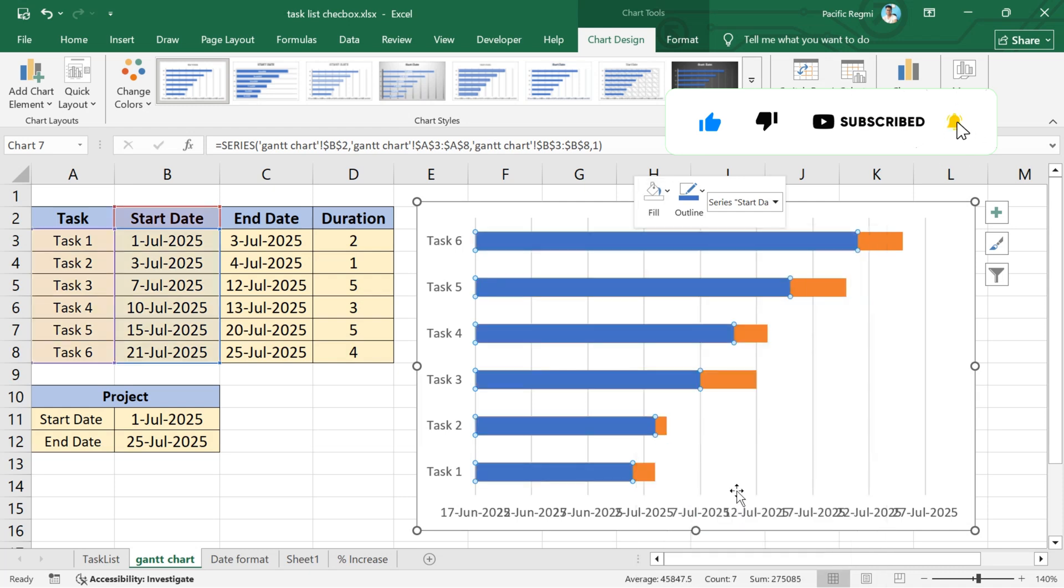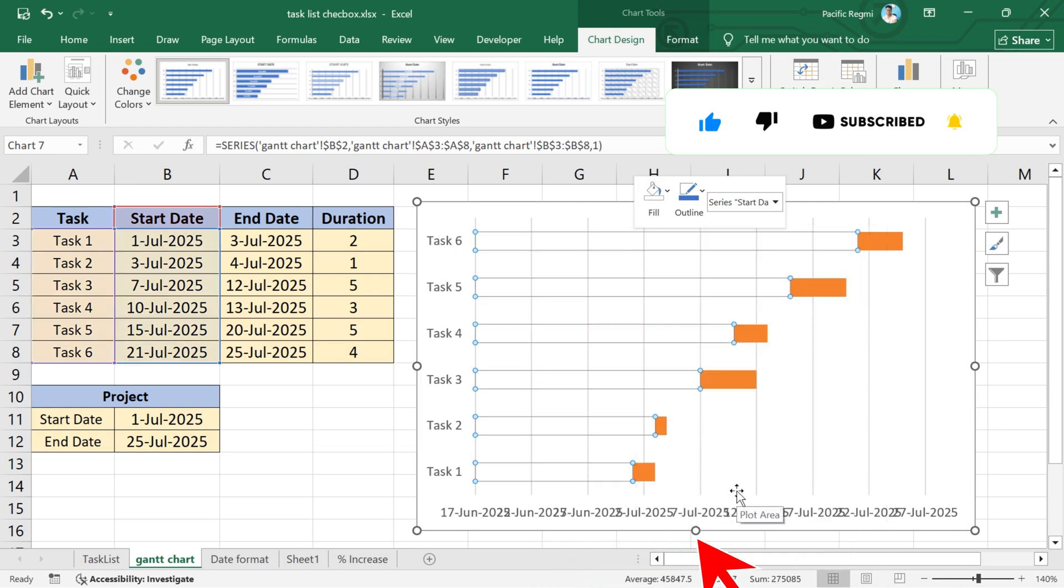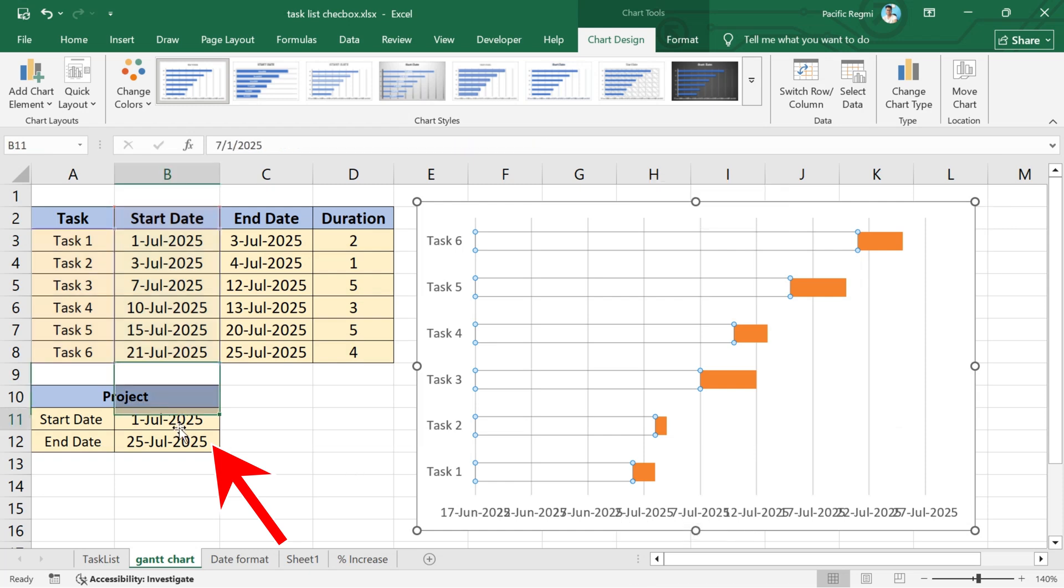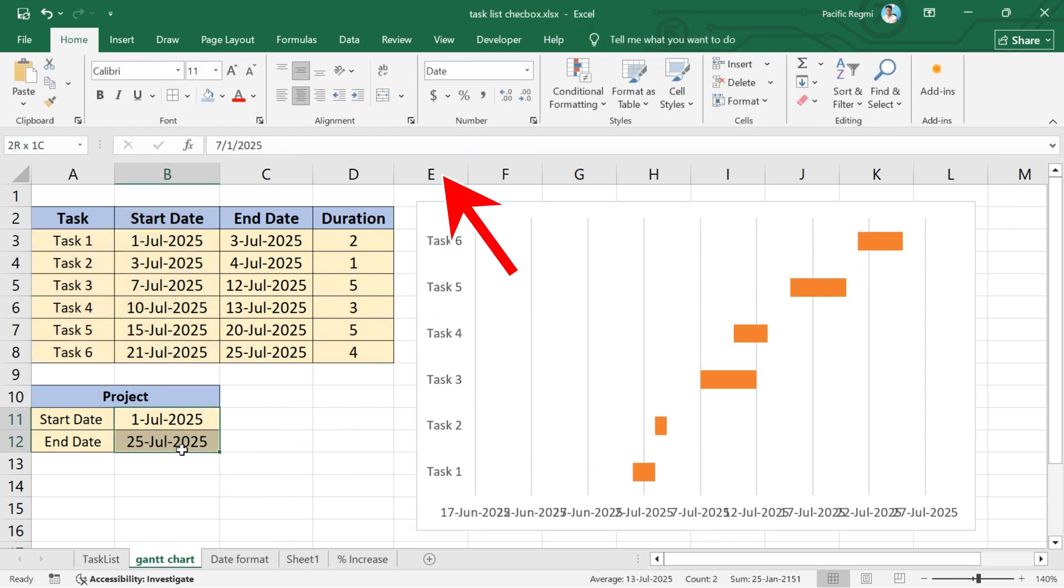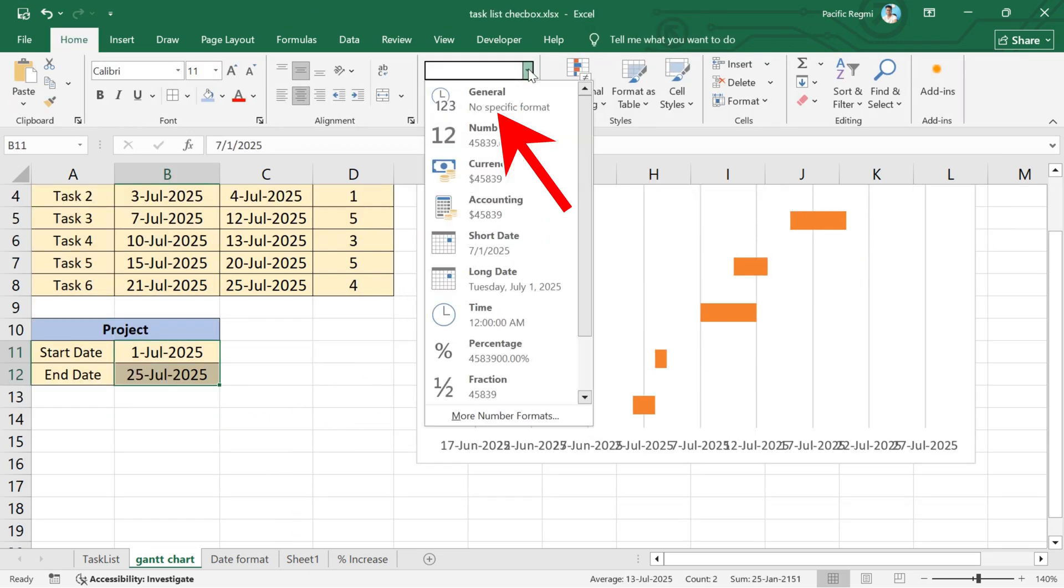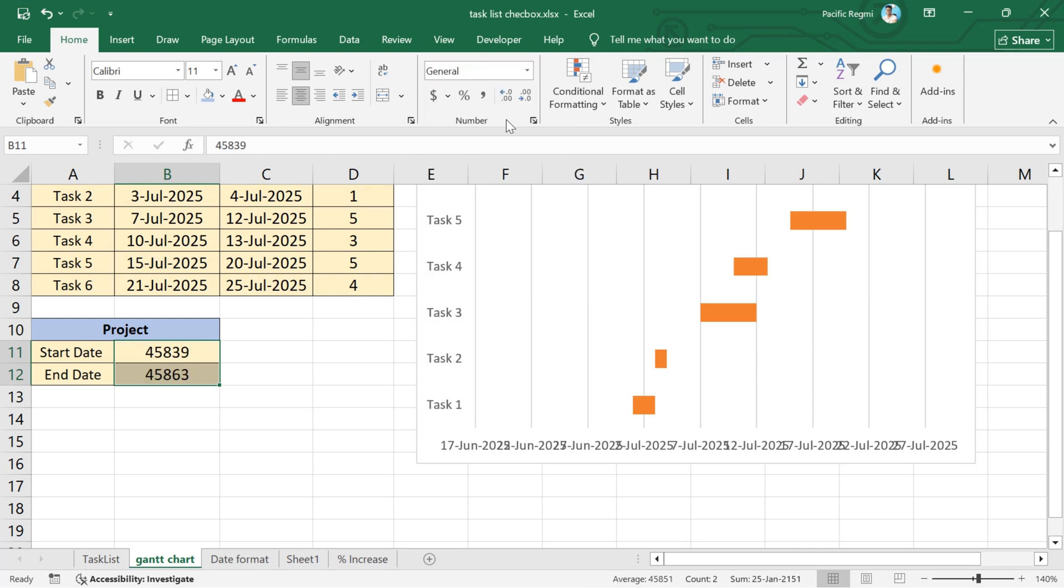Now, to fix these date spaces, select the start date and end date of the project. From the numbers section of the toolbar, select general.